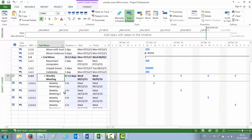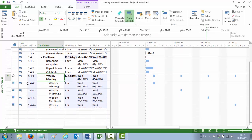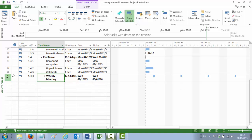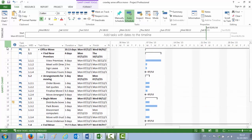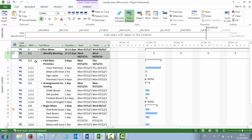Your recurring task of weekly meetings has now appeared. The next thing you need to do is to move that. Minimise it, and if you click on the row by going to the number on the left-hand side, it'll highlight the row. Once it's highlighted, go to the left-hand side again and you'll get a mouse with a four-way arrow. When you have that mouse, you can click and drag. You get a black line that lets you drag it up and place it under Office Move as the first activity. So there are my weekly meetings entered and moved — that's point number 9.